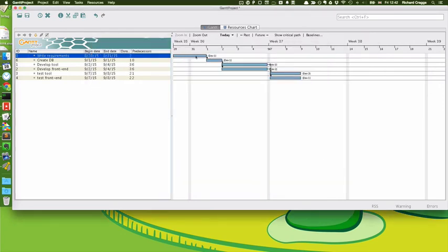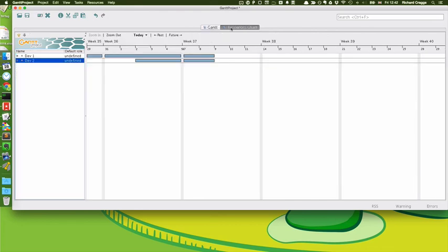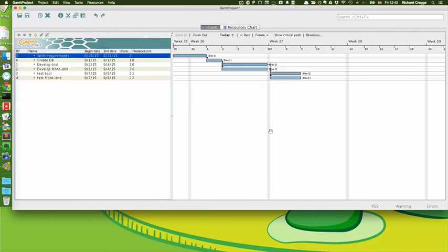So here, for the first 1, 2, 3 days of the project, developer 2 is not very busy. They're not doing anything. And we could have developer 2 doing that, but you've always got one of your developers waiting around, and that's because we've got hard dependencies at the end of the project. How do you avoid that is a more advanced topic. Can you somehow rearrange or split up your tasks so that you haven't got people waiting around? It's quite an advanced thing. So now we can see on our chart that developer 1 is busy throughout, developer 2 is a bit lazy at the beginning. But that's it really, that's our chart.